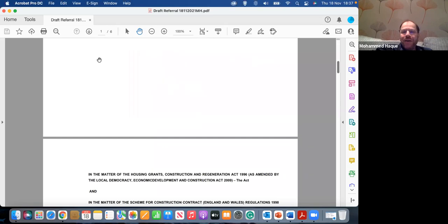And I prefer to actually add, if it's under the scheme, in the footnote. I didn't give it to you because some people do not like it, but if it's an adjudication under this scheme, in all my decisions I do this. On day one, when I start writing the decision after receiving the referral and accepting it and notifying that I have accepted the submission, what I do is I put in the footnote the date of receiving the referral as day 0. So 28 days to be counted from the next day. And then the adjudication decision due by. It keeps everyone on notice that you have 28 days.